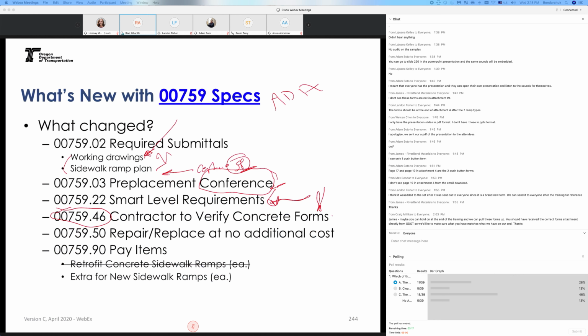At the end of the day, if it fails, telling the contractor it's your own cost to replace it, because we're trying to work with you. What I was trying to tell the contractor, we're trying to work with you all the way through to make sure at the end of the day, if all this passed, the only thing that failed is between the pouring and the finishing, that's where it fails, and that would be the contractor's responsibility to replace it.